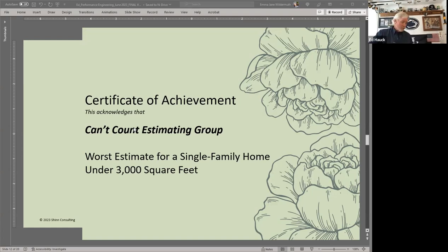Some of the larger builders, regional builders, and especially publics, they have what they call an auditor. The auditor is not an estimator. The auditor kind of is independent, may report to the director of purchasing, but I want to go out and make sure what we're estimating and the usage is the exact same as the intent.